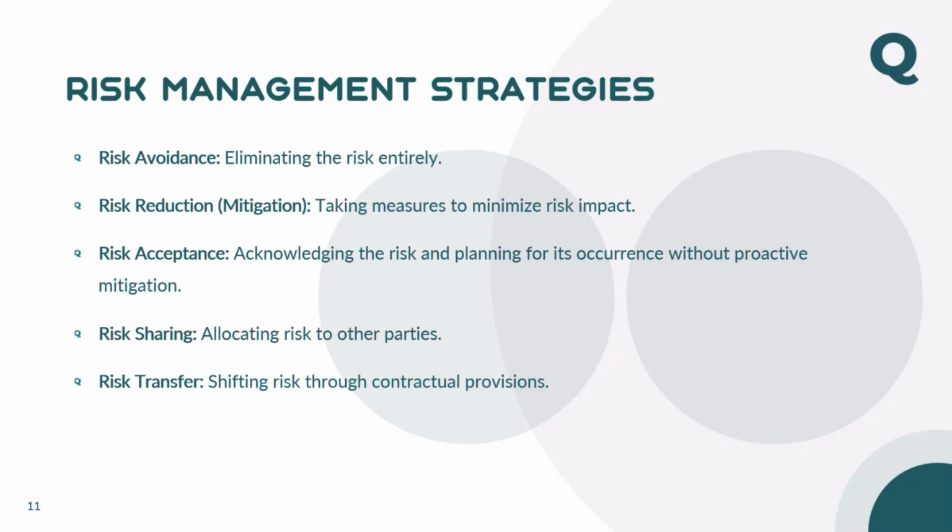If the employer asks, you can tell him, dear employer, you're not paying me for this initial mobilization, so eventually I have to go to a bank or a financial institution, get some money, and I have to pay the interest also. So I'm going to load that. This is called acceptance, and move forward.